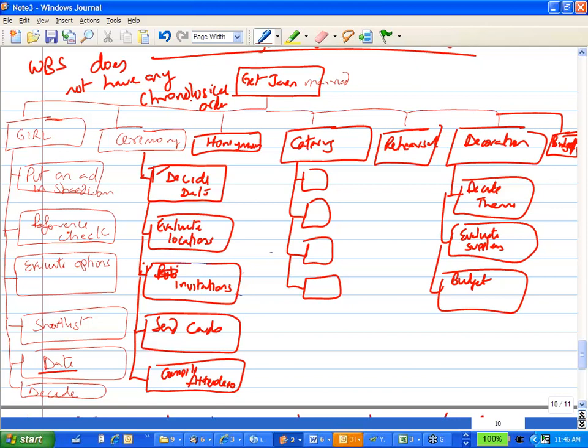So then we as a PM assign. Oh, good question. Do you as a PM assign? Yeah, I think so. Except that again, you are getting help from the technical manager. So if the task is to create a wireframe, then you may not know who in this team of 20 developers does wireframe. So the technical manager tells you, give it to Joe Blow. Then if the task is create test cases, again, the QA manager will perhaps allocate resources for you. But again, it's a team effort.